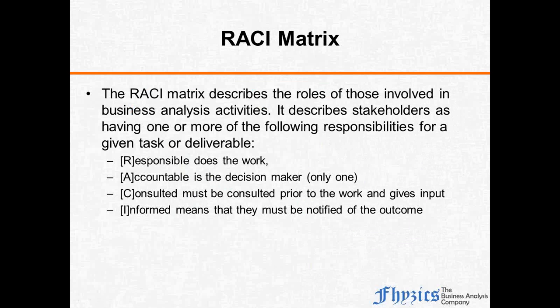Accountable are the people who are the process owners, and they are responsible for the decision making. Let us take a bank branch. The tellers who are sitting in a row, where we do this transaction, the tellers are the people who are responsible. They carry out certain activities, they do these transactions, and they are not authorized to change any of those processes. That rests with the branch manager.